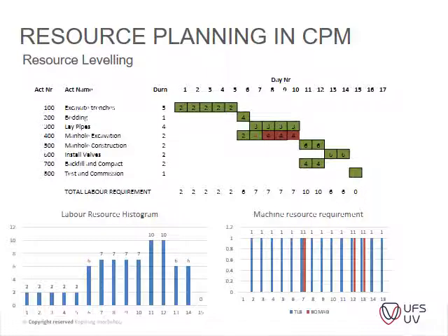Okay guys, so what we did was a bit of resource leveling. Instead of on day 7 where we required 2 TLBs, we only used the TLB to lay the pipes. But if we don't use the TLB, it extends this manual excavation. Instead of being completed within 2 days,